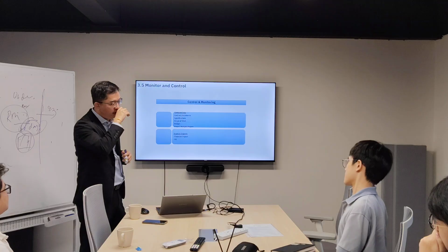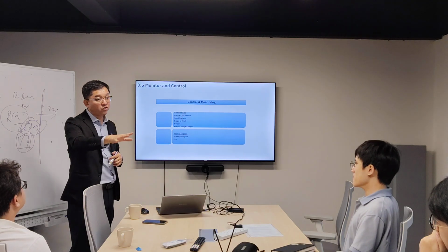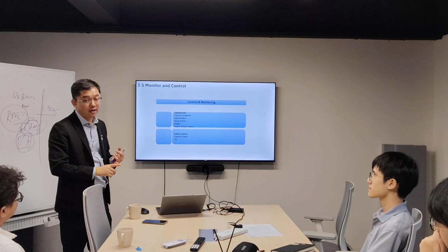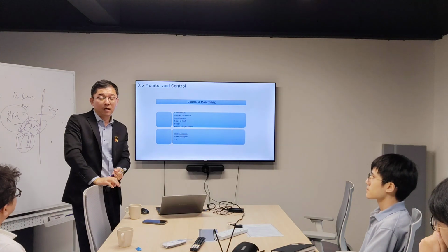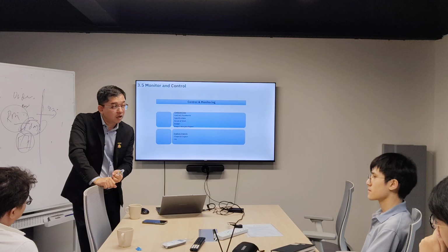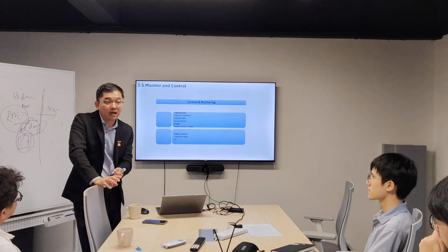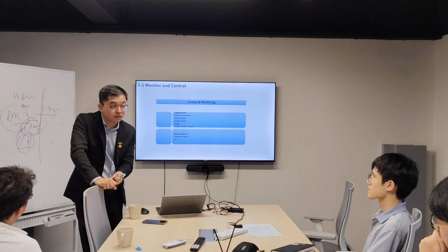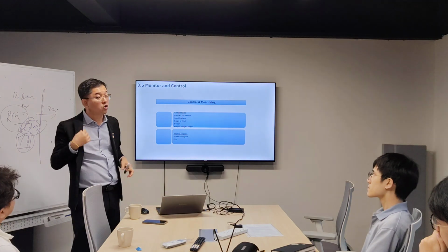But of course, again, it depends on the contract. In the Malaysian market, there are different contracts, for example PAM, and the second is IEM form of contract. For international projects, normally they use FIDIC, so it depends on the contract.